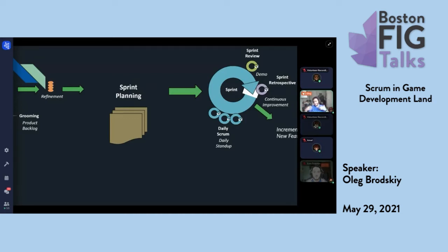The team can discuss amongst themselves, whatever. But we keep doing that until either everybody decides, hey, I can't do any more work, or we finish the backlog, right? Those are the only two exit conditions for sprint planning. And people decide for themselves when is too much. So at any point, someone on the team can say, you know what, I've taken in these 3 tickets. I think that's as much as I'm going to be able to get done this sprint, and that's fine, right? It's not the Scrum Master's job. It's not the product owner's job to jump in and say, well, I think you can really do a 4th one. We have to trust the team's estimates,